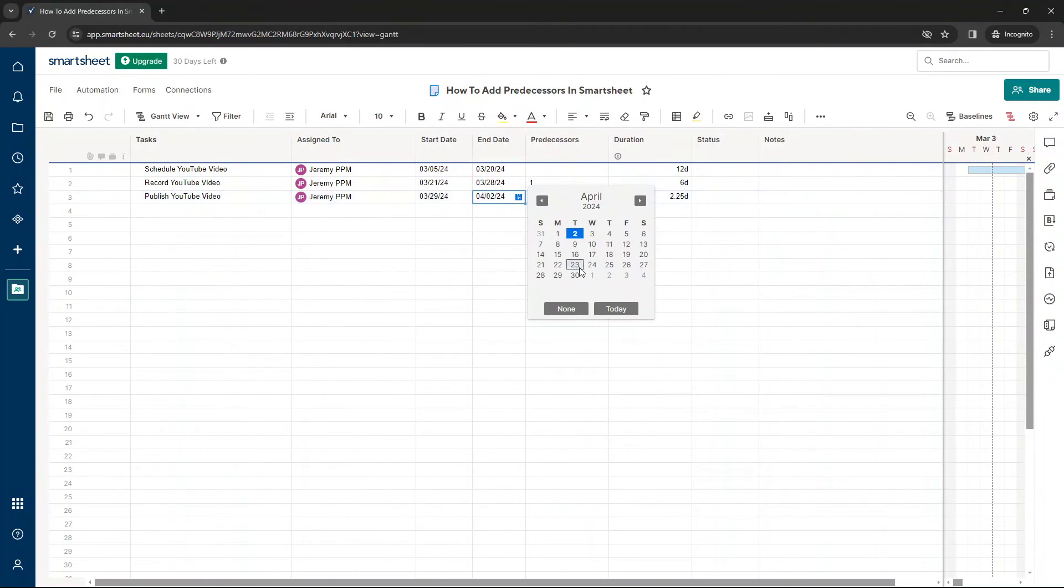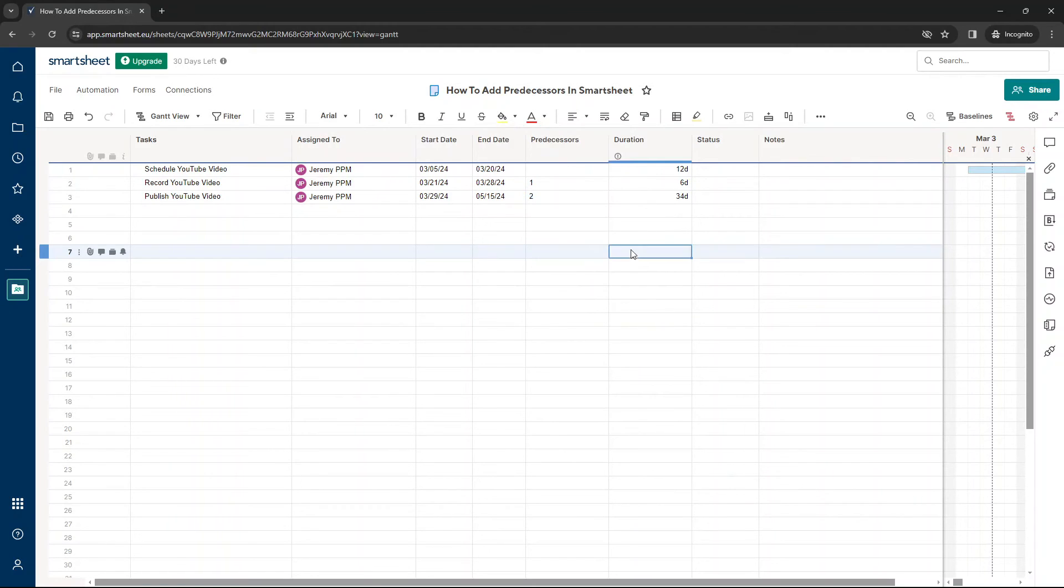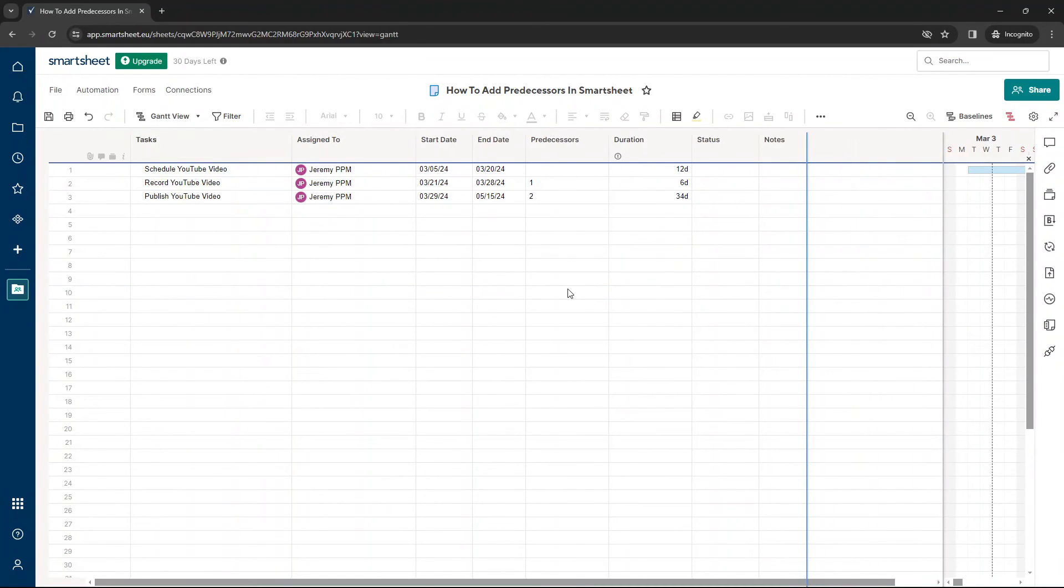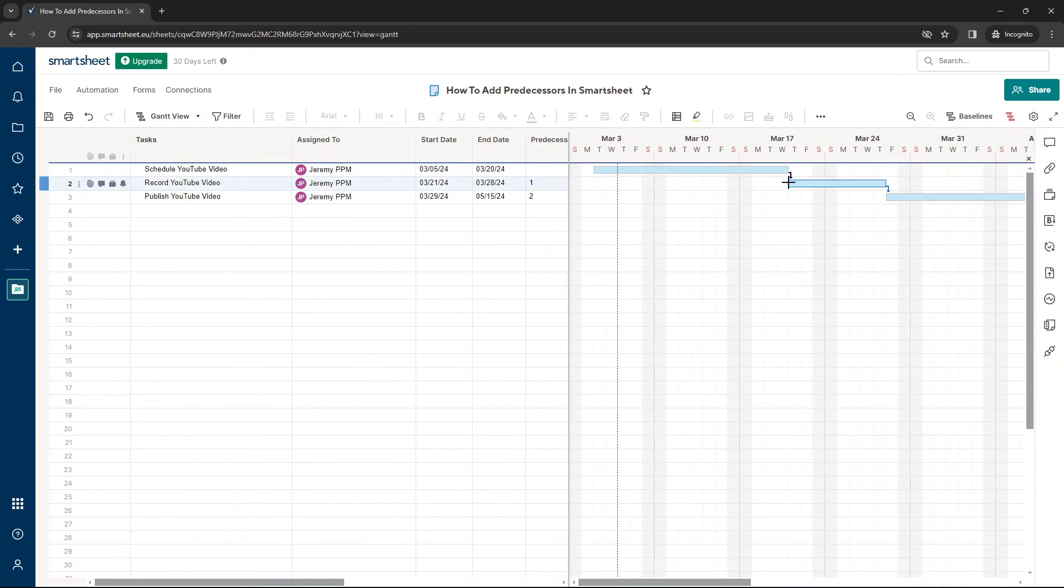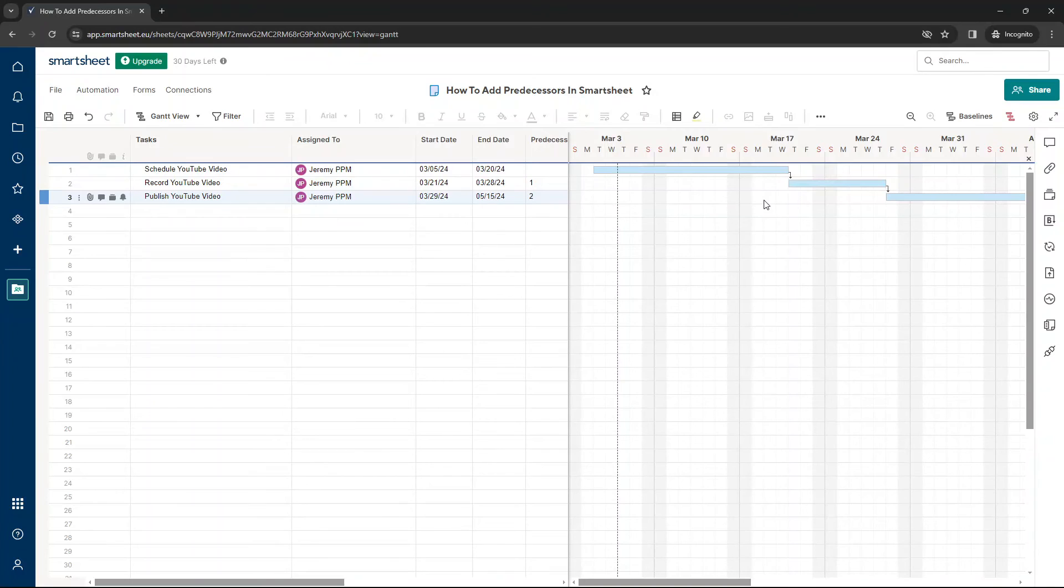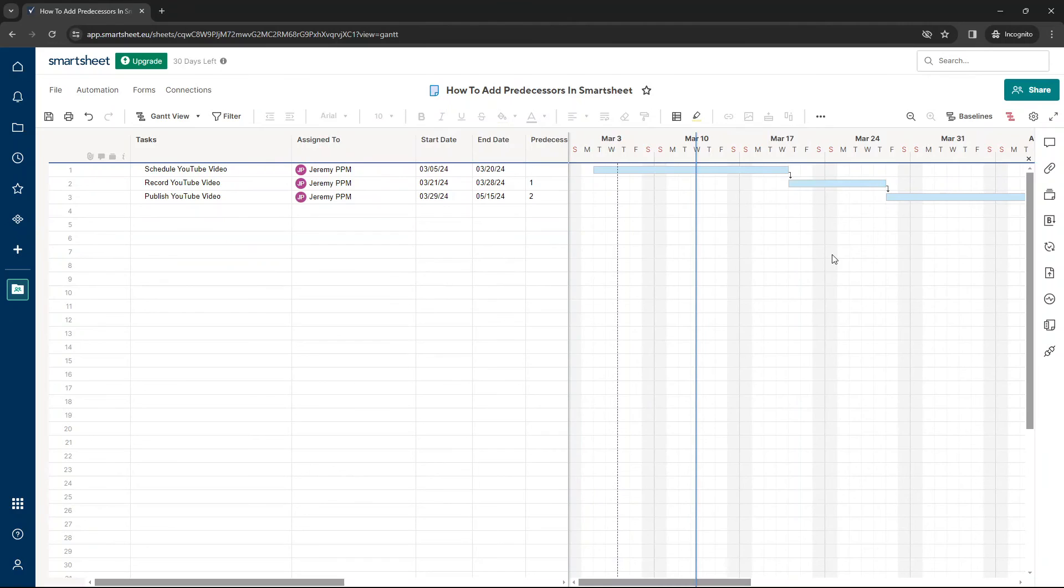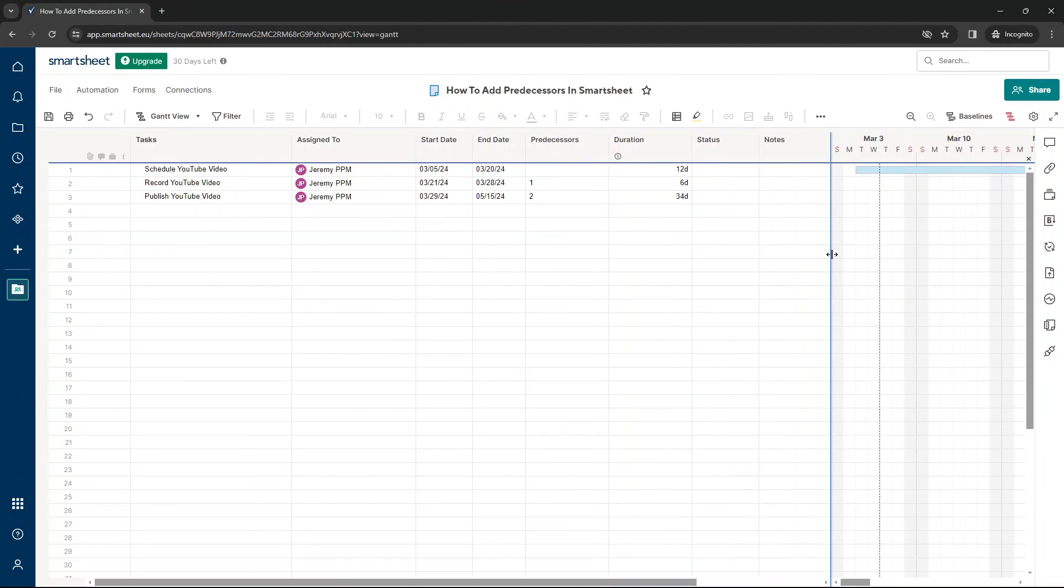And let's just change this to next month at some point. It's changed the duration days. And if I was to go into the Gantt, back again into the Gantt, you'll notice that it's all connected. And I don't need to play around with anything because the predecessors are in place. So it just saves a lot of time. It's really worth setting these up. And as you can see, it doesn't take long.